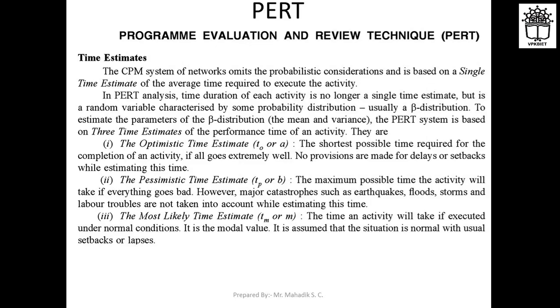All right. Then let us see what PERT is. PERT is the Program Evaluation and Review Technique. The time estimates for the CPM system of a network omit the probabilistic considerations and are based on single time estimates of the average time required to execute the activity.